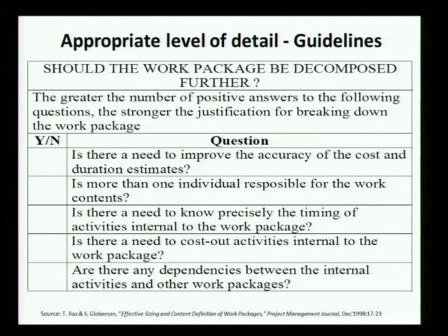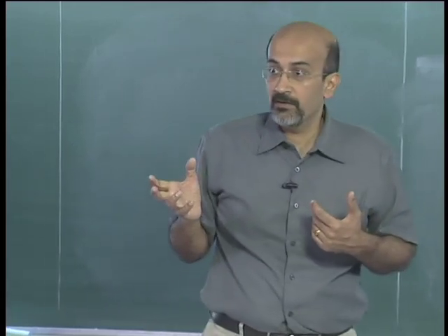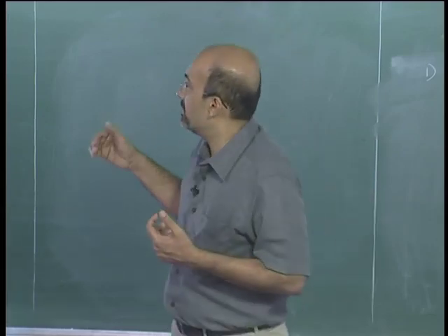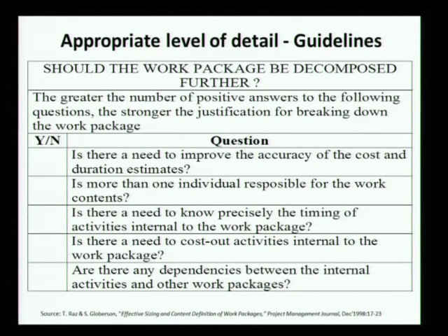Now I have just put this to show you. This is a question that is asked very commonly: what is the level of detail? There are guidelines such as this which give you a checklist. If you take a look at this list, should the work package be decomposed further? It says the greater the number of positive answers to the following questions, the stronger the justification for breaking down the work package. See, it's not a black and white rule, it's a grey rule. It says greater, stronger justification, and that's the nature of the job.